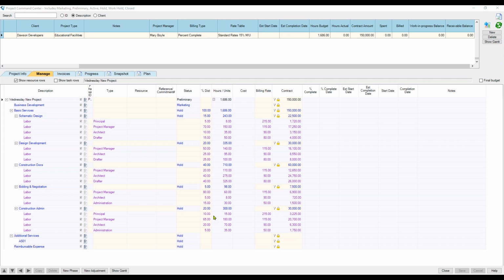And then Dion said, could we use the resource hours to be X% less than the contract amount? And that would be communicated out using the Schedule Manager. We can, Dion, but we would have to do it by editing the hours. So I don't have two percentages here, one for the contract and one for resources. But if I had adjusted these hours the other way, it would have showed that our resource contract was less than our billing contract. And it's these hours that go to Schedule Manager and widgets.